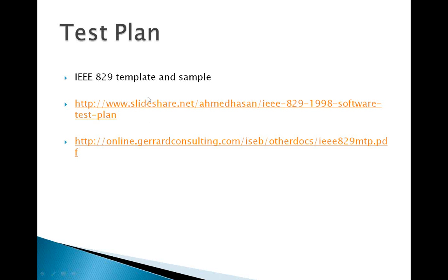How to go ahead with agile methodologies and test planning? In agile methodology, let's say the Scrum methodology, you have sprints, and typically the recommended sprint is 20 working days. The user stories, when you develop them, the test planning has to go hand in hand with those user stories. And the team here means all the people: developers, testers, release engineers.